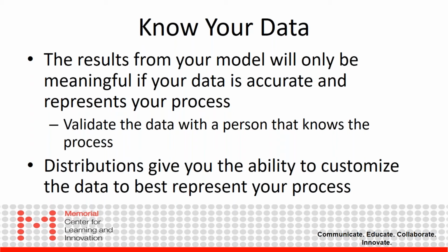So door might be the time from when that patient is physically walking in the front door, or is it the time from when they're checking in with the triage nurse, or is it from the time when they actually get back to the emergency department? So there are a lot of different definitions for different data points. Going back and validating this data with the people that work that process will ensure that you're feeding good data back into your model.